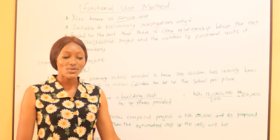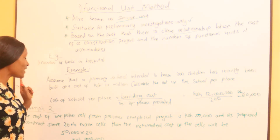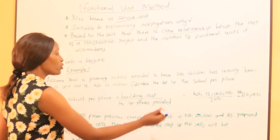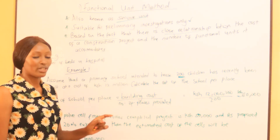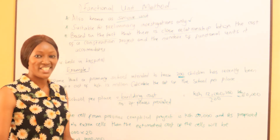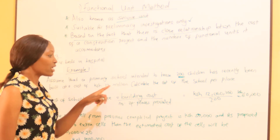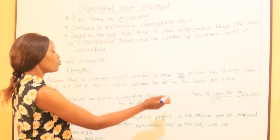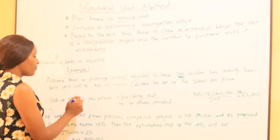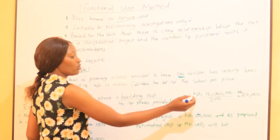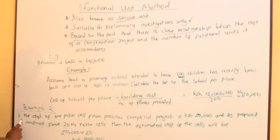Let's do two worked examples. Example one: a primary school intended to house 200 children has recently been built at a cost of 12 million. We are asked to calculate the total cost of the school per place. The school carries 200 students and cost 12 million, so cost per place equals 12 million divided by 200, which gives us 60,000.